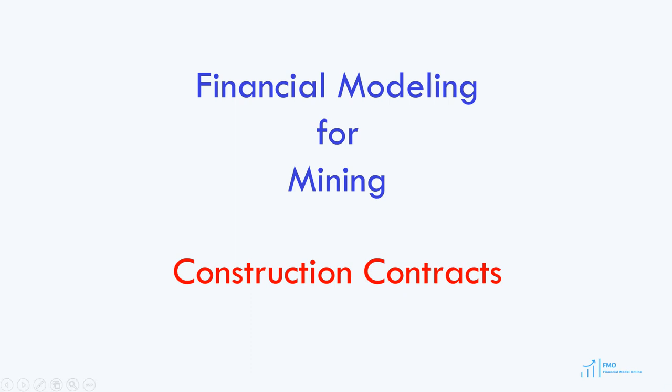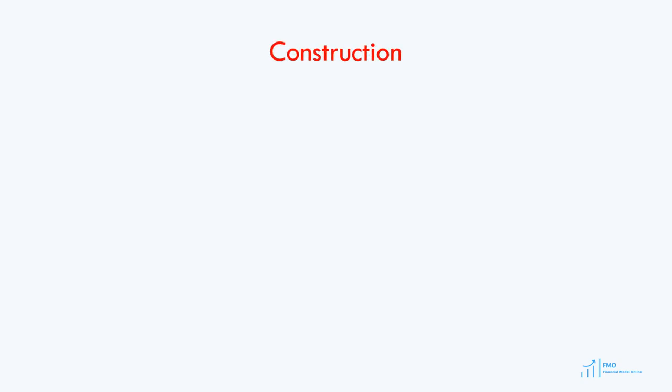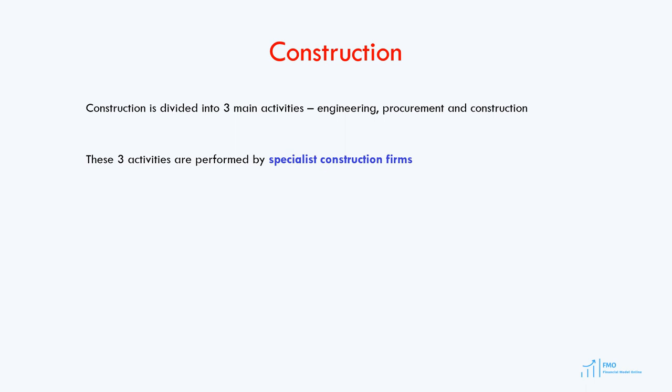In this lesson, we'll go over the main construction contracts in the mining industry. Construction is usually divided into three main activities: engineering, procurement, and construction. These three main construction activities are performed by specialist construction firms.